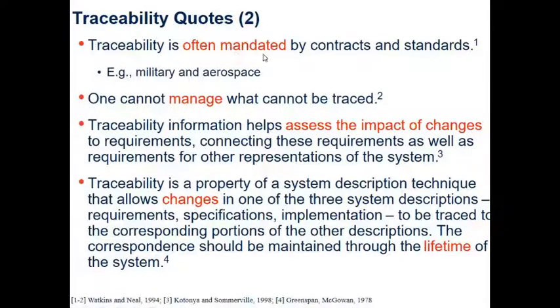Traceability is often mandated by contracts and standards. Example, in military and aerospace, you must carry out traceability. One cannot manage what cannot be traced, right? Traceability information helps assess the impact of changes to requirements, connecting these requirements as well as requirements for other representations of the system.